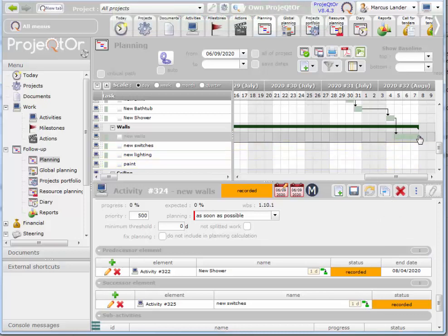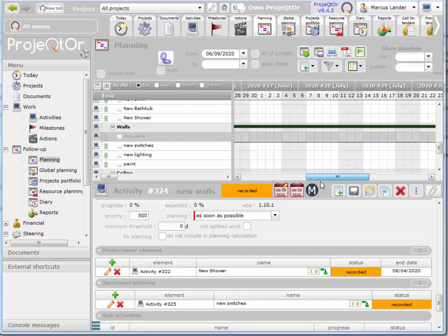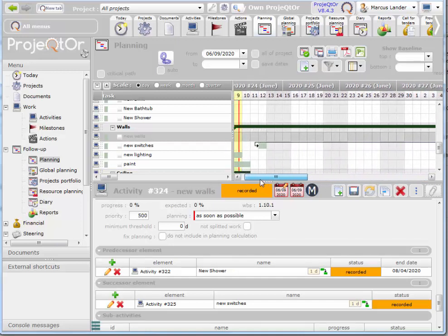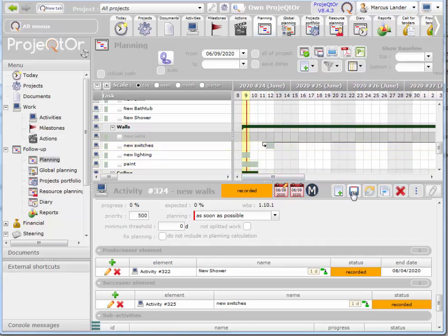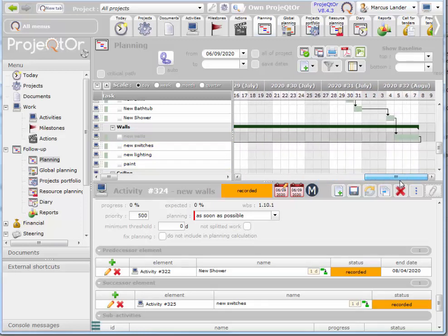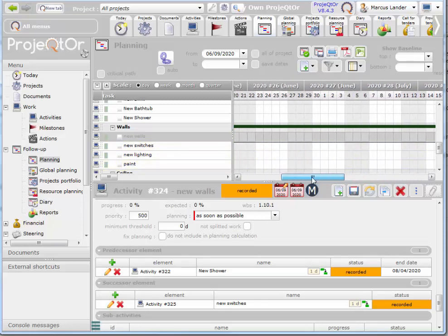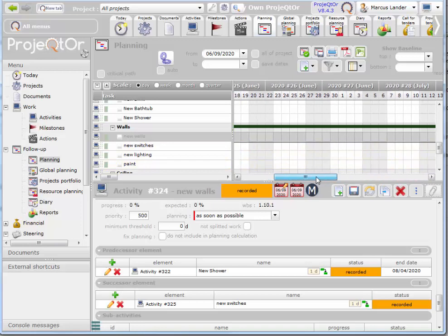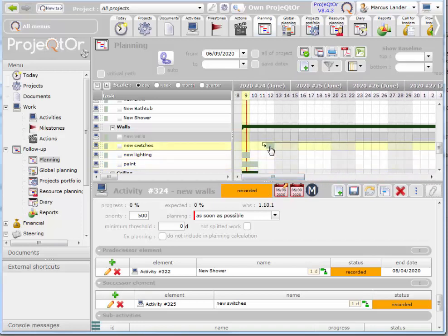So you'll notice that the link goes all the way back to the original date that we added this item. So if you want that task to actually go after the previous task, we said this one ends and then this one starts. Presently it doesn't look like that. It looks like this one ends and then this one starts way in the past.